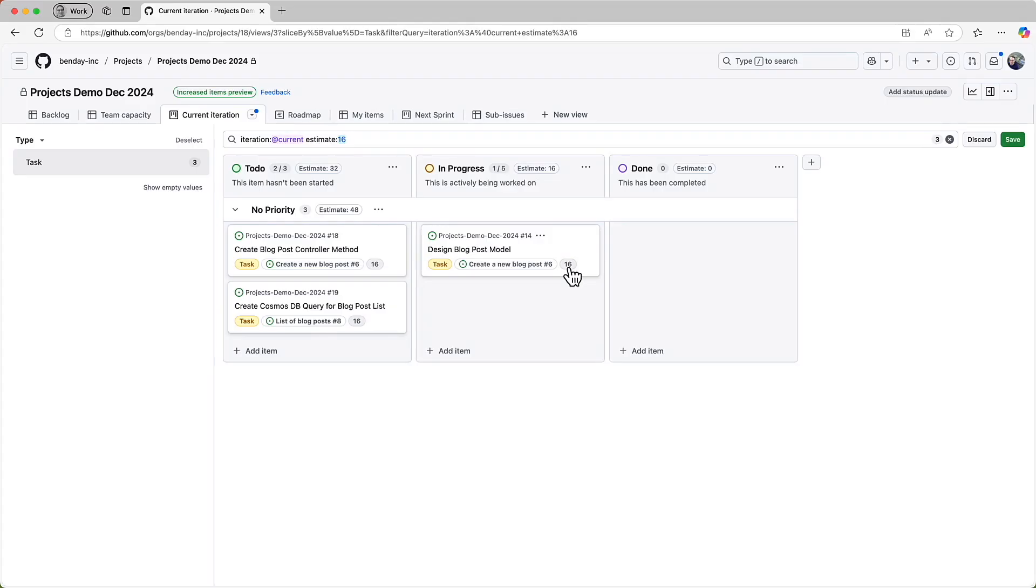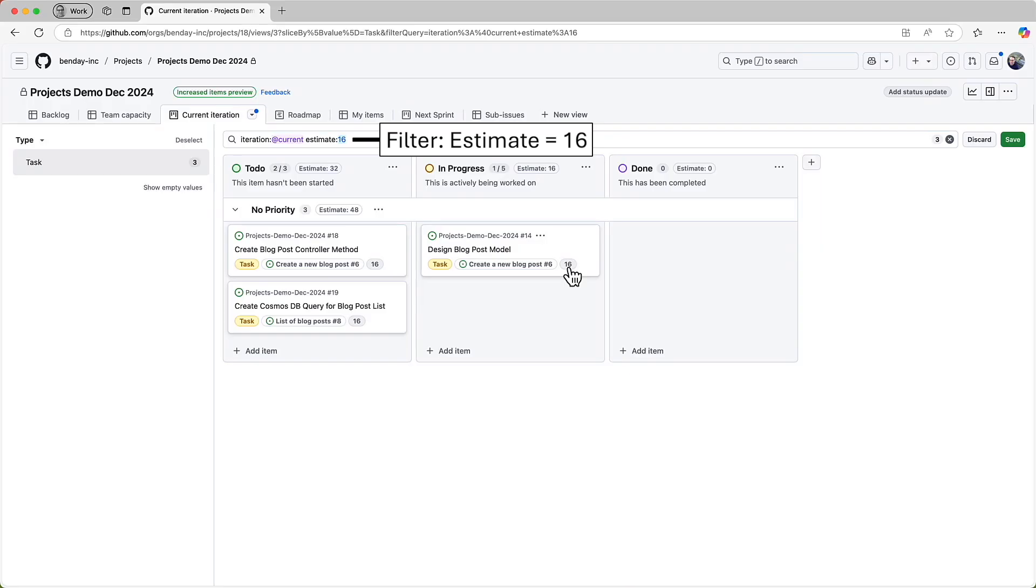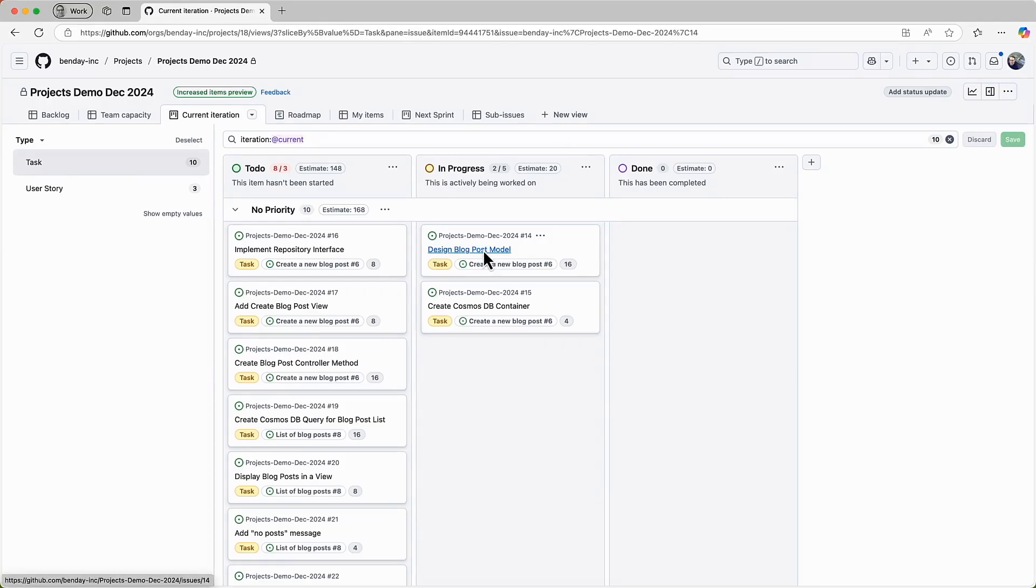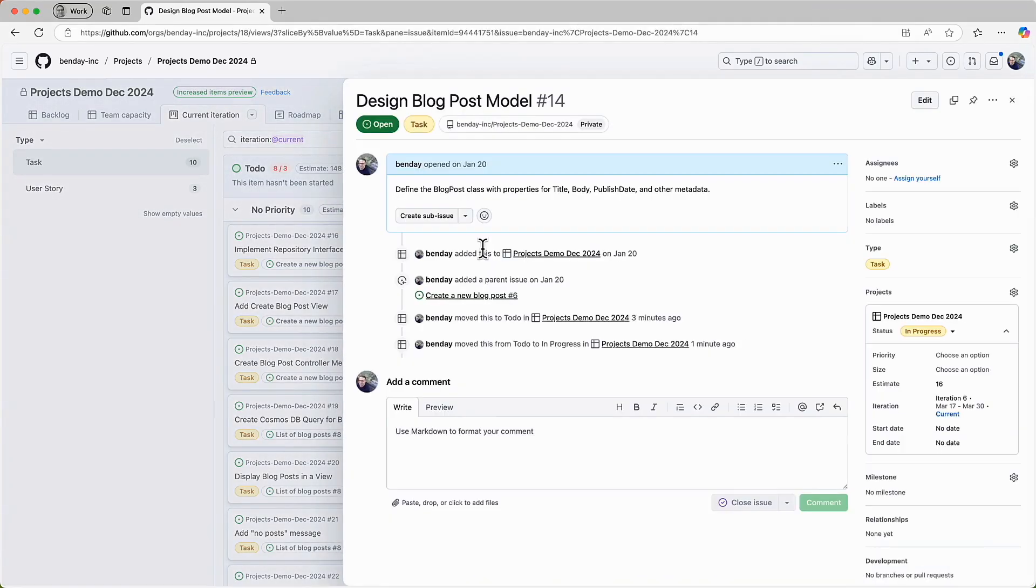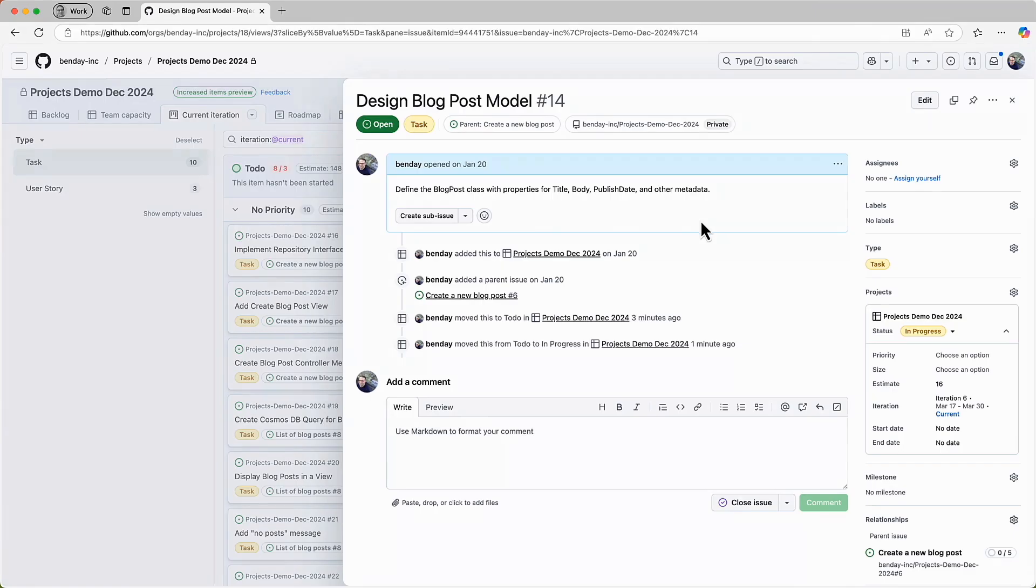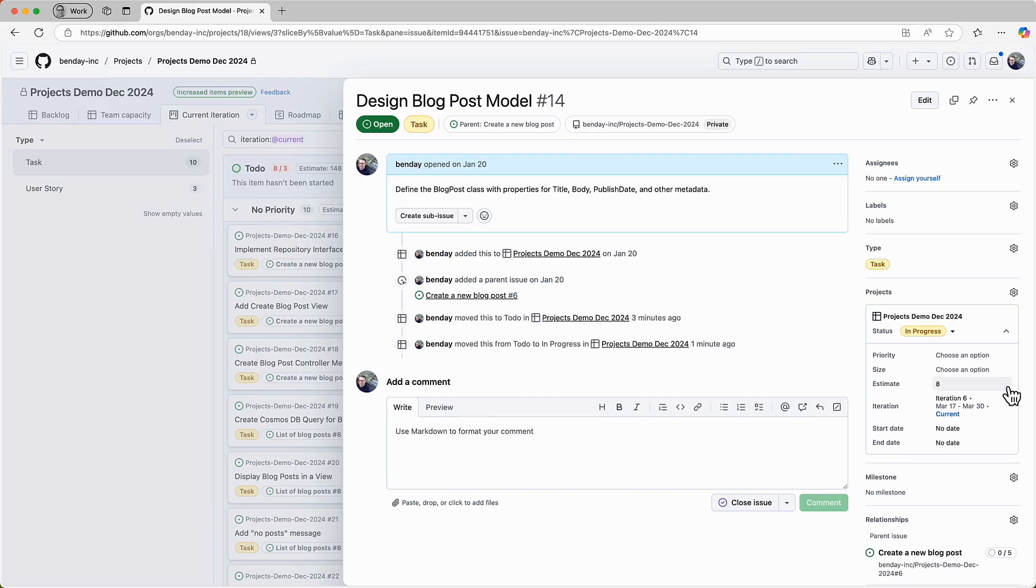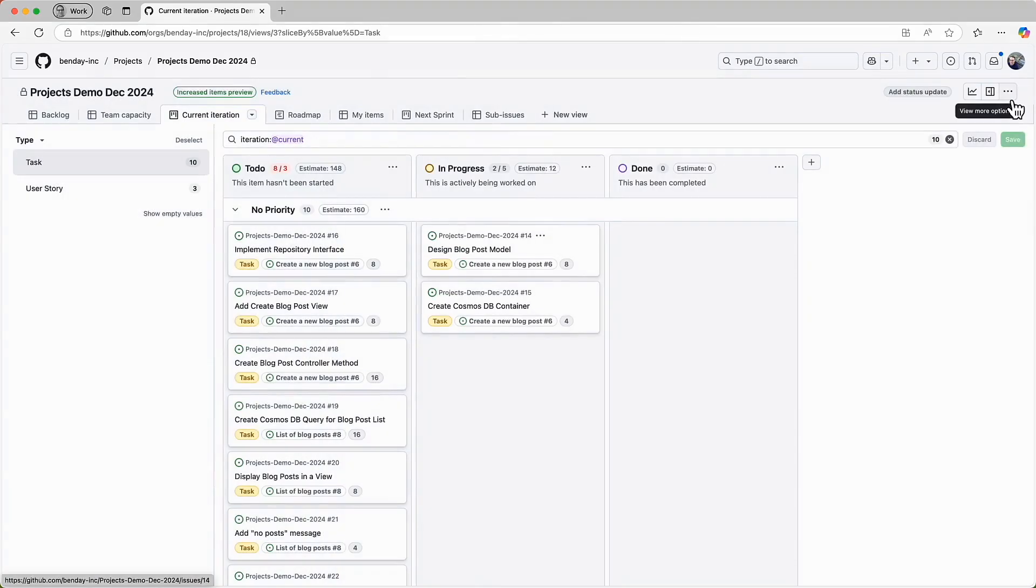I expected that that would let me edit that value. Instead, it's added a filter. It's filtering this view to show us everything that also has an estimate value of 16. That's not what we wanted to do. To get back to where we were, click the 16 again, and that'll clear the filter. To edit the estimate, we'll need to open the item. To open the item, click on the title value for the item. And that brings up the editor. Then you'll go to the estimate field for the item and change the value. So change that from 16 hours to eight hours based on our new estimate of the remaining work. Be sure to click the check button and then close the editor by clicking the X button.